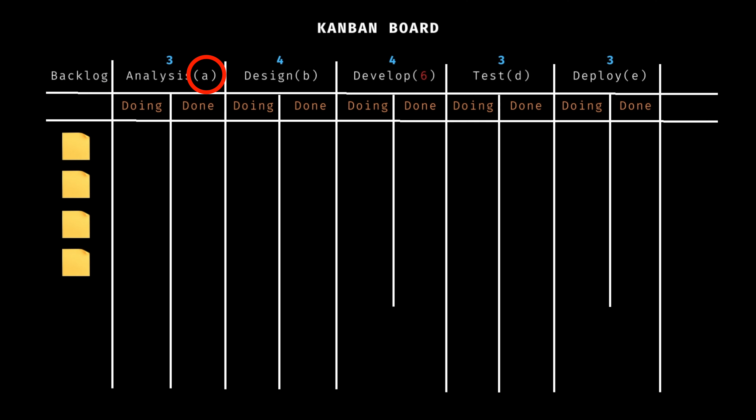Now, after doing all of this, calculating the WIP limits is as simple as adding a 50% buffer to each of these numbers. Adding 50% buffer gives us a WIP limit of five in the analysis column, six in the design column, five in the test column, and five in the deploy column. There you have it — your Kanban board is now set up with carefully calculated WIP limits. Remember, limits may change, so make sure to keep monitoring the team's progress and adjust the WIP limits as needed to optimize your workflow.